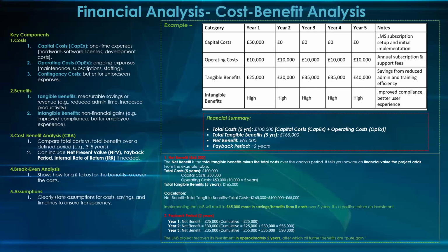So the point where you start making profits, you know that you are now more relaxed because you start making profit. When you start seeing that you're making profit on your initial cost, you see that it's being made. And that's what I'll call a payback period. 2 years is when we estimate that. Yeah.